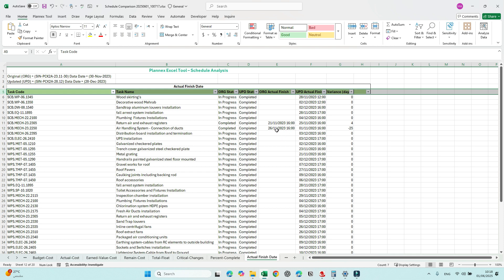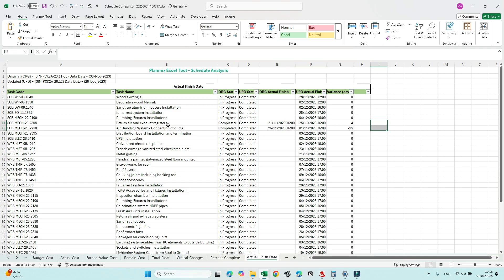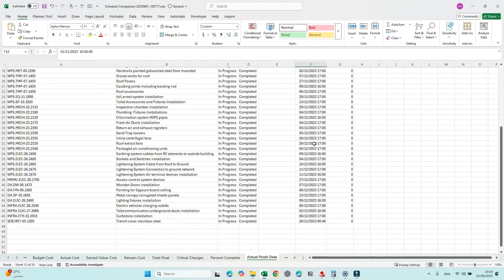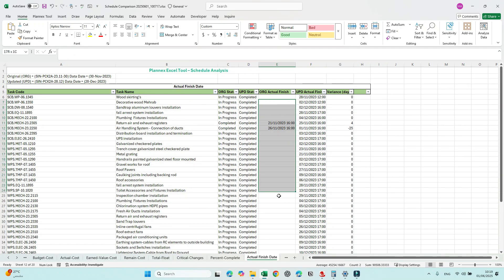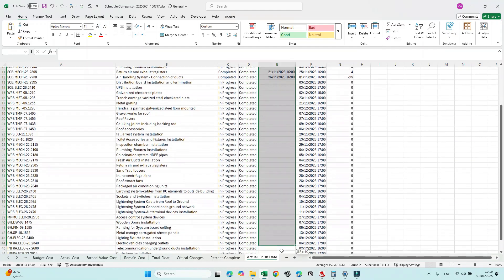Actual Finish Date: using the filter again, we see two activities whose actual finish date changed — we need to justify why the actual changed from 21 November to 25 November, and another from 26 November to 1st November. Also confirm nothing is beyond the cut-off date.